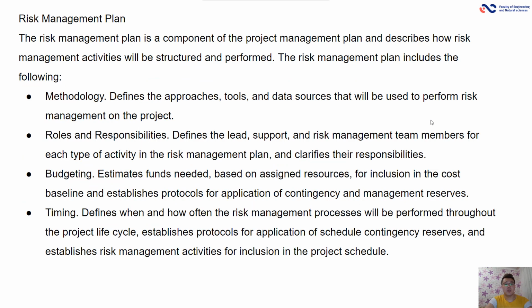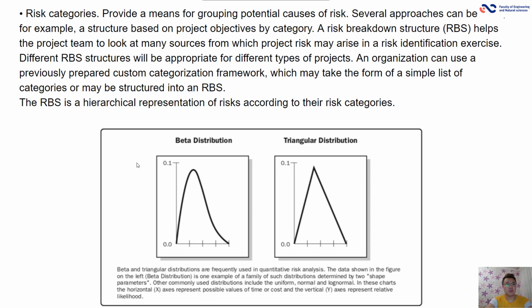The risk management plan is a component of the project management plan and describes how risk management activities will be structured and performed. The risk management plan includes the following: methodology, roles and responsibilities, budgeting, timing, and risk categories.